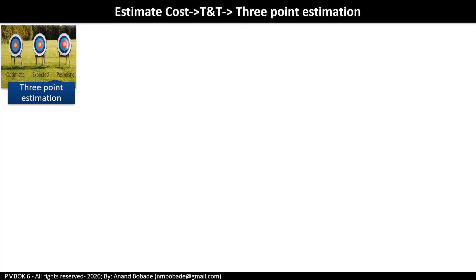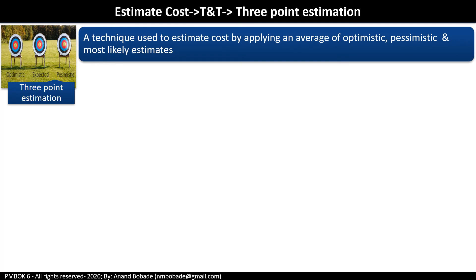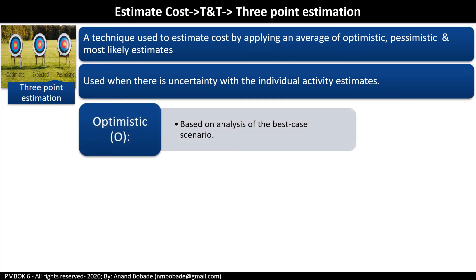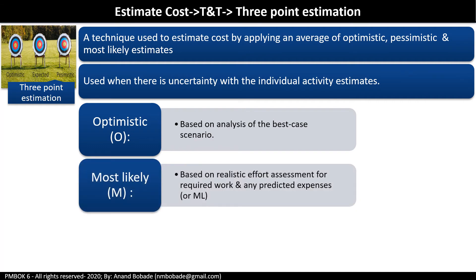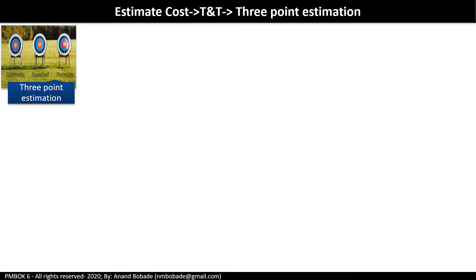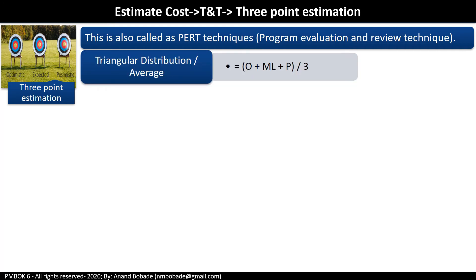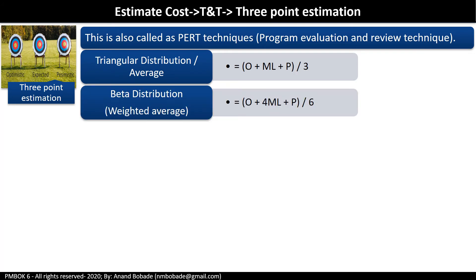Three-point estimation is used to estimate cost by applying the average of optimistic (O), pessimistic (P), and most likely (M) estimates. It is used when there is uncertainty with individual activity estimates. Optimistic is based on the best-case scenario, most likely (ML) on realistic effort, and pessimistic on the worst-case scenario. This is also called the PERT technique — Program Evaluation and Review Technique. Two formulas: triangular distribution (average) = (O + M + P) / 3, and beta distribution (weighted average) = (O + 4M + P) / 6.